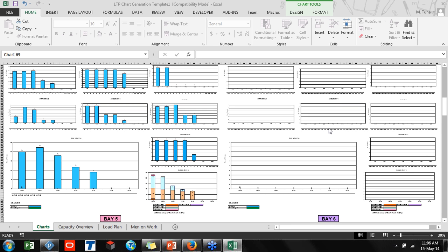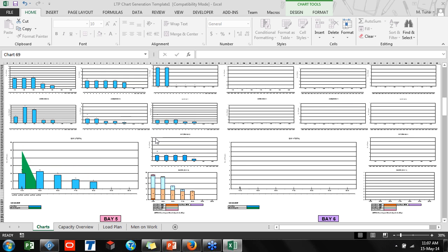Okay, there is a question. If we have a bigger project, like with 5,000 activities, is it no problem for Asta, a 5,000 activity project? Can we optimize the resources? Yes, we have methods for optimizing resources, such as the line of balance method, and we can also use resource histograms, as well as resource leveling.